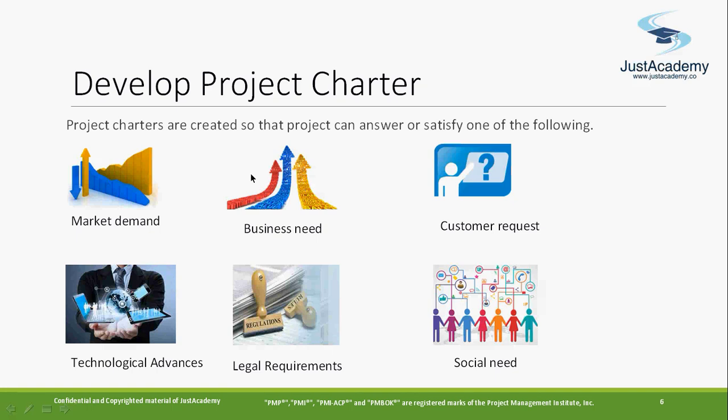Project charters are created so that a project can answer and satisfy one of the following. Like the market demand: whenever there is a market demand, you have a new project, and when you have a new project, you're going to create a project charter. Business needs: you already have an e-commerce website and are looking to go for an iOS and Android app. That's a business need, so maybe you'll work on one project and build a project charter. Customer request: sometimes a specific customer asks for specific requirements, and you're going to work on that. So that's a customer request.